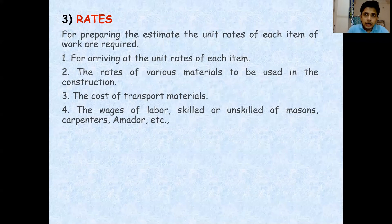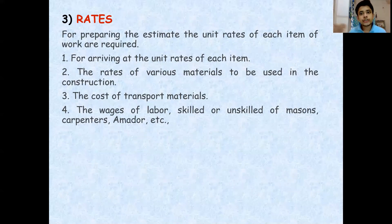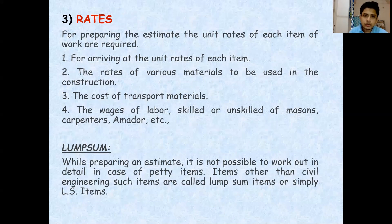These schedules of rates are not published every year, but rates change frequently. So the department allows us to add certain increments. For example, if the Assam schedule of rates was published in 2015 and we want to do work in 2020, the department will say that based on the current market situation, you can increase the 2015 rates by three, four, or five percent. We multiply the rates by that factor and find out the estimated cost.